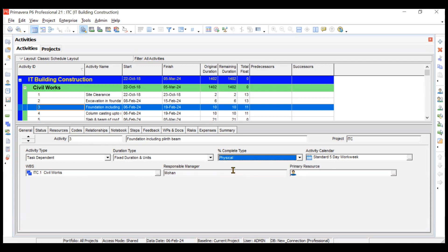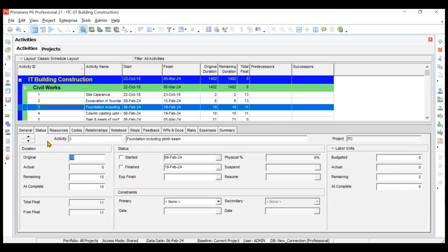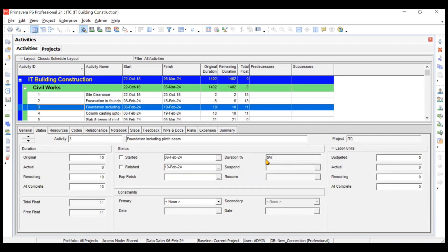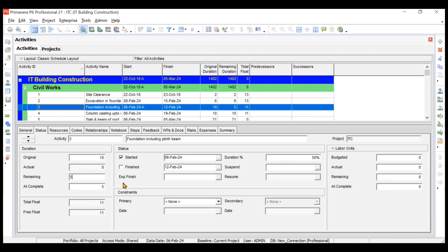Let's see the practical difference. Going to the status tab with activity type set to duration: original duration is 10 days. If I set duration completed to 50%, then press Enter, the remaining duration automatically becomes five days. Since 50% of the time has elapsed, it says the activity is 50% complete.